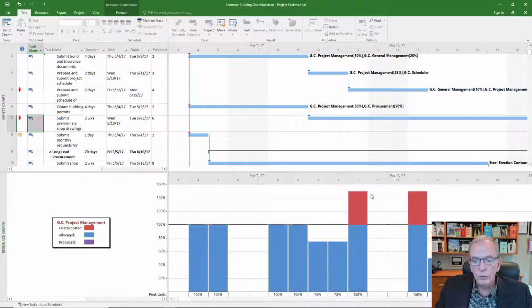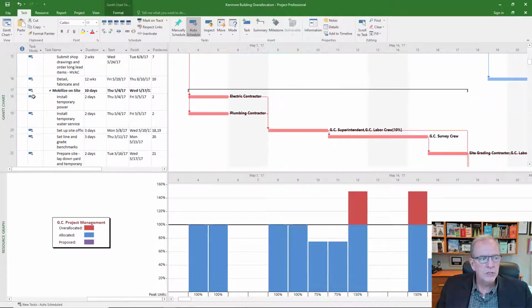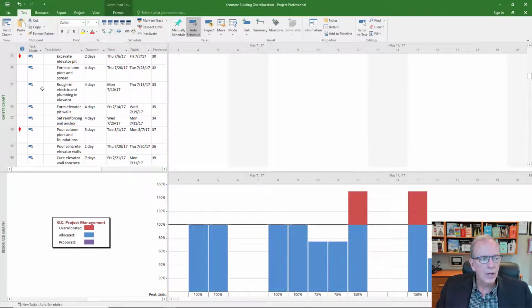And you can scroll through and see, where are they over-allocated? Okay, what do I have to do with that to fix it? Very often, that's going to lengthen out your project schedule unless you do other things. So you've got to be cognizant of that. But that is probably the best way to go at it in a very detailed way, step by step, getting rid of all the resource over-allocation so that you shouldn't see any more resource over-allocations listed in any of the charts.